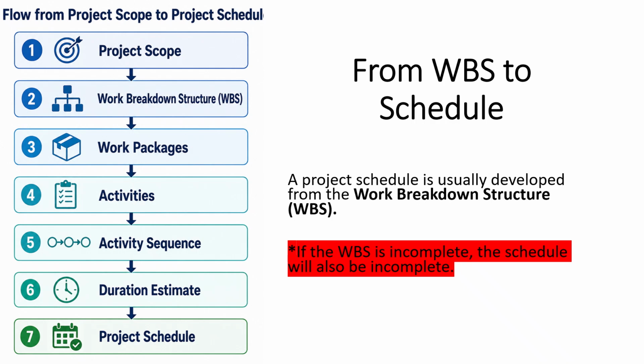From the scope, we develop the WBS. Then the WBS is broken into work packages. After that, work packages are converted into activities. These activities are then arranged in sequence, followed by duration estimation. Finally, we can develop the project schedule.